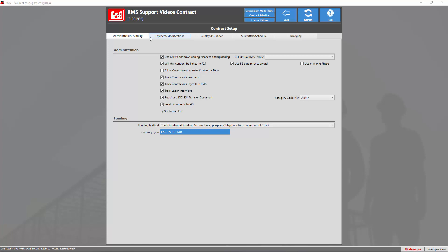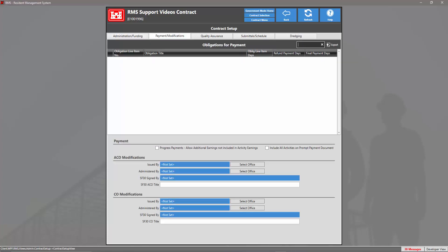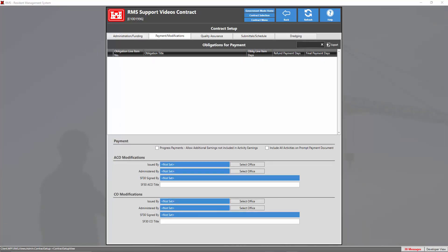On the next tab we have our payment modifications tab. In the payment section, the first checkbox — progress payments allow additional earnings not included in activity earnings — if marked, will allow the contractor to bill for stored materials and performance in payment bond. The second checkbox, include all activities on prompt payment document, if marked allows us to see all invoices at an activity level instead of a CLIN level. Down at the bottom we have our ACO modifications and CO modifications.